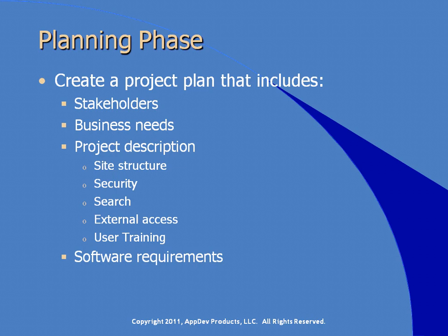Software requirements. List the Microsoft and add-on software that the servers will require, and separately list required software for clients that connect to the servers. The hardware requirements. List existing hardware that the project will use and include the general specifications for any new hardware that the project requires. And finally, schedule. Create a timeline for the key phases of the project. If you work for a medium or large company, you may have a business systems analyst who is a pro at creating project plans like this. However, you'll still probably be asked to contribute to the project description and requirement section.